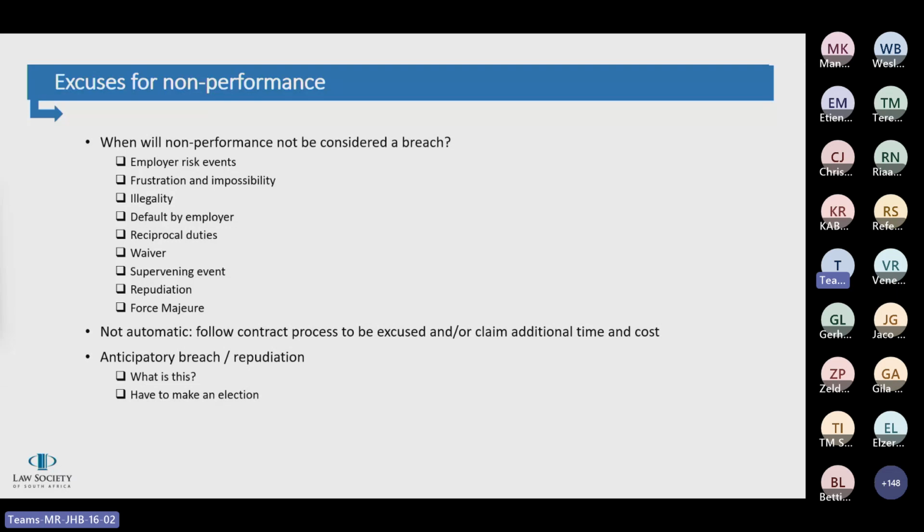The question of what is an unreasonably long period of time is one of fact, unless it is specified in the contract. And in the event of the contract being terminated due to a force majeure clause, certain financial obligations can still be applicable and could be paid at a reduced rate.